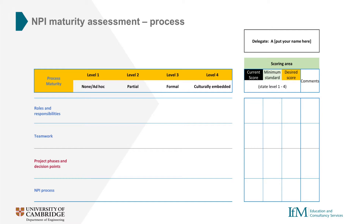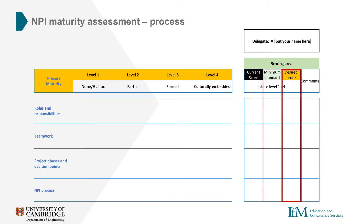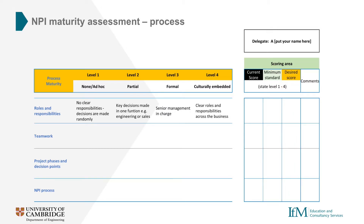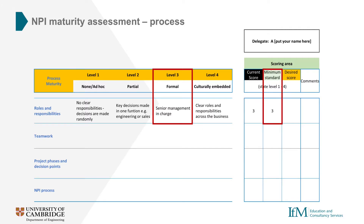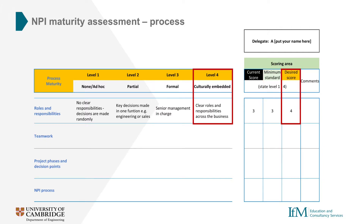For each category, we should assign three scores: first, we assess where we are now; second, what we think our minimum standard should be; and finally, where we think we need to get to. As an example, let's take a look at the first area in the process section: roles and responsibilities. As an engineer in Great Ideas Limited, we might think that right now our senior management are firmly in charge and score this as a level three. We probably also think this is the minimum standard - it works for us, but falling into a more disorganised state would really damage our process. Finally, we need to think about where we would like to be. We can see that a more embedded and less directive approach, where roles and responsibilities were clearly defined, could be a big help, and hence we set our desired score as a four.